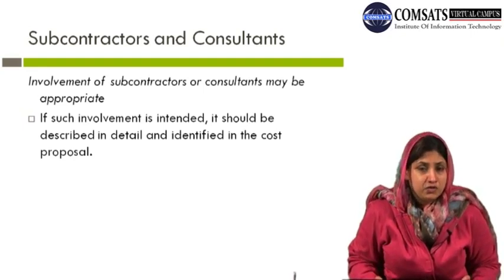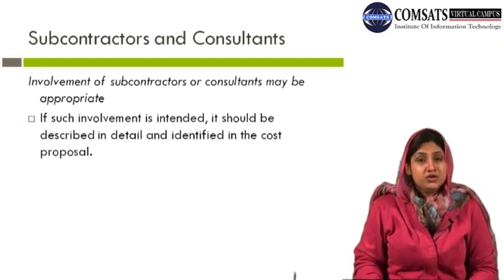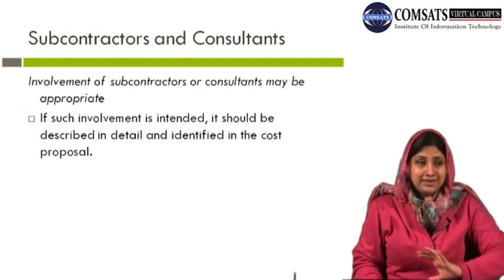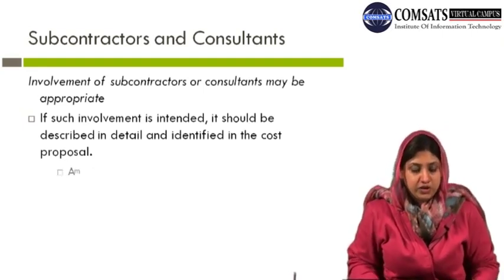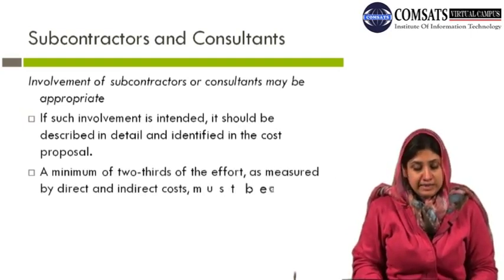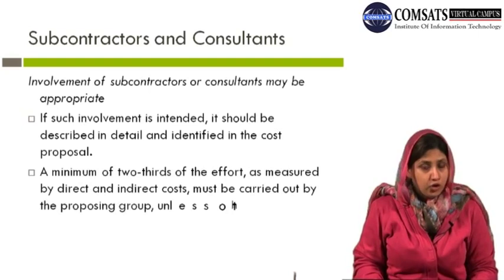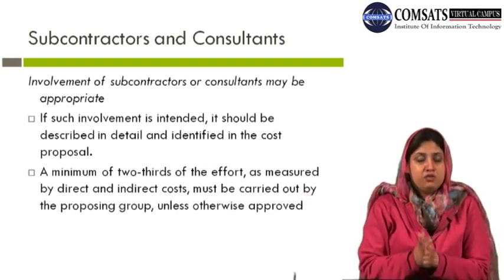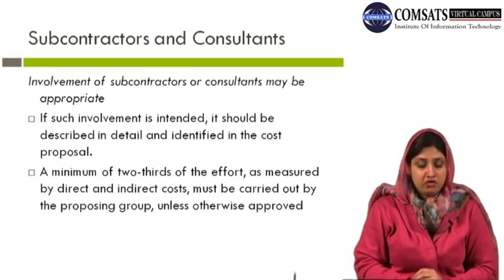If there is any expectation of change, your reader should know that at this point a change is possible, and these are the variables which control this change. If such involvement is intended, it should be described in detail and identified in the cost proposal, because later on, if you write one statement and your proposal is accepted on that statement, legally you cannot bring any change.